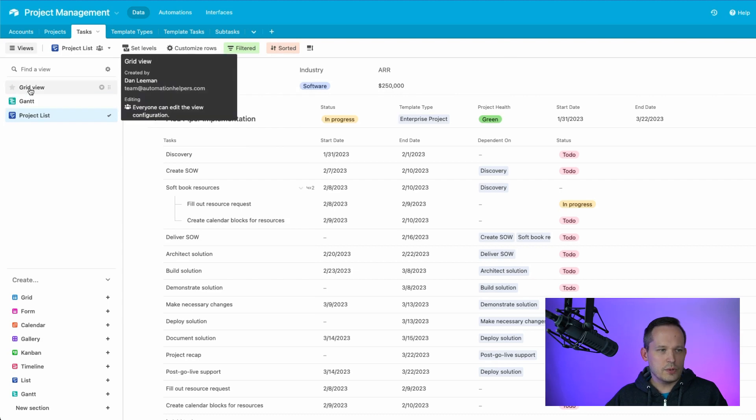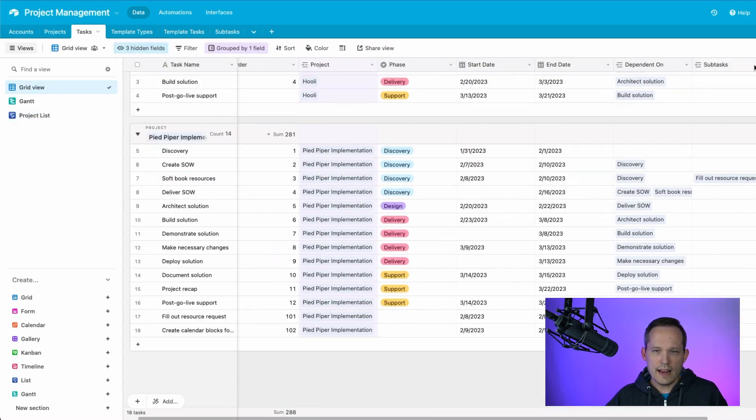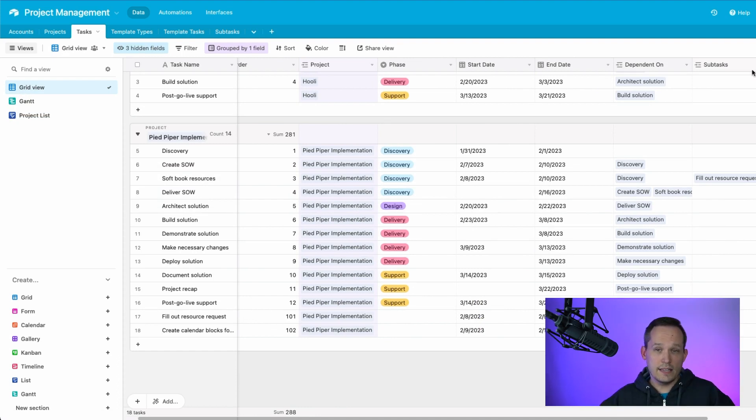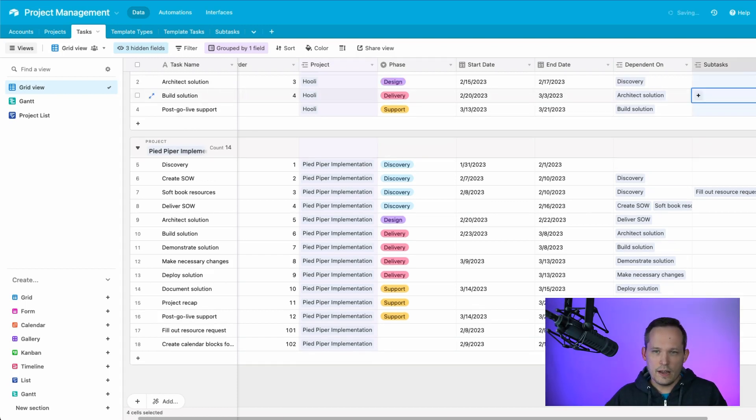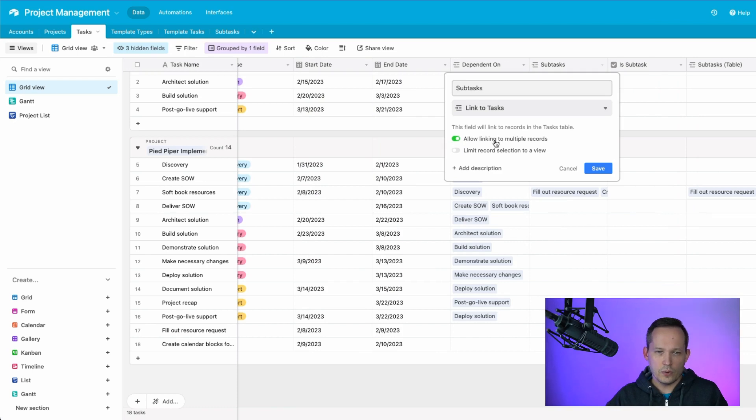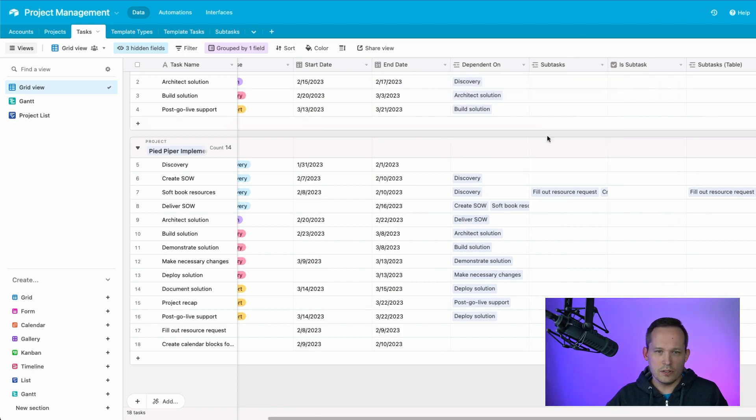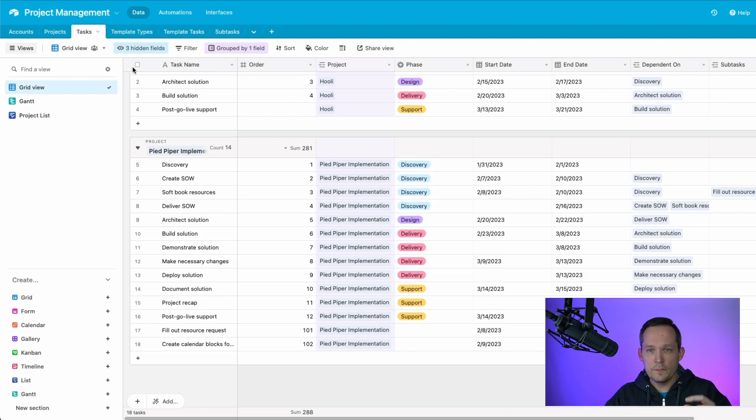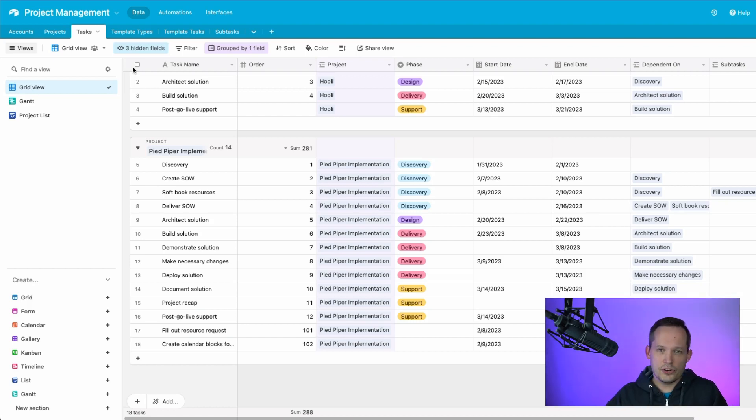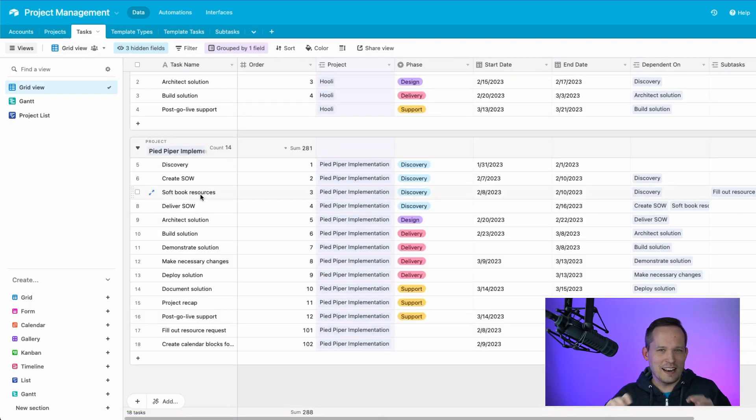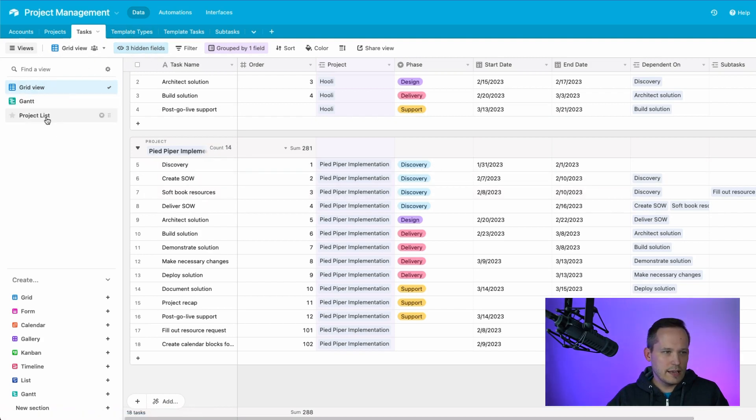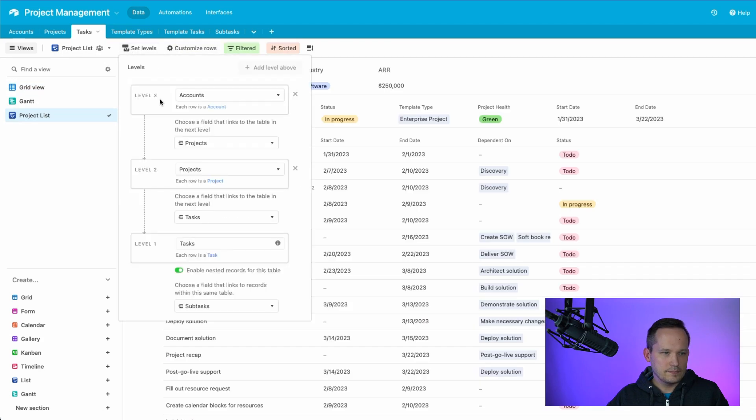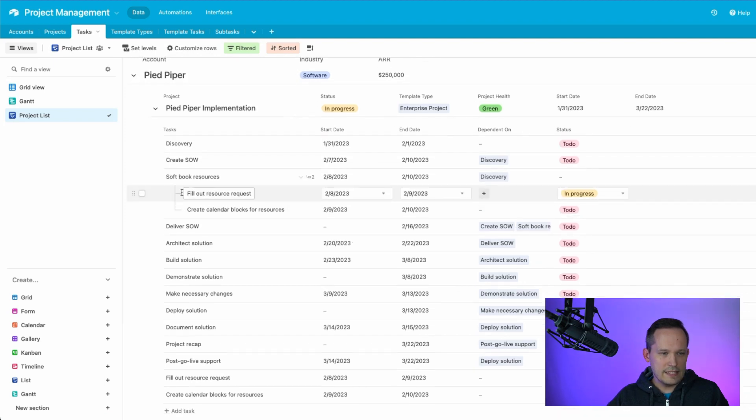And then one thing that I did differently here is that I enabled nested records for this table and I could tell it which field that was. Now, before we get too into it, I want to show you what this looks like on the grid view side of it, which is that I added a subtasks field and this is just a linked relationship to itself. So if we open and modify this, edit the field, you'll see that it's just a link to itself, a link to the tasks table. And we're allowing linking record to multiple records to be able to get that relationship. And that's how we'll be able to see the nested objects. The first time I was testing this, I actually did it the other way where I created the parent relationship. I said parent task on there, but that's how it has to be. It has to be more from the parent level and going down in order for that to work.